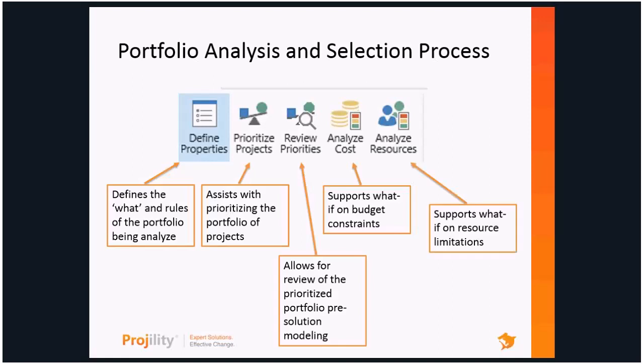The next part is people. And we find that most organizations, while they're cost constrained, really are heavily resource constrained. They may not have the people to do the work that they have in their pipeline. So it doesn't matter that I have $15 million. I've got 5 projects here I just can't staff because we don't have the resources.